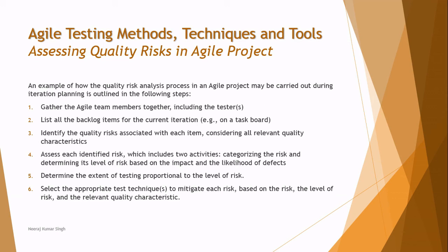Step five: determine the extent of testing proportional to the level of risk — how many test cases have you written and how much testing you are performing. You address risk areas depending on the level of risk, which is determined by impact and likelihood. Step six: select appropriate test techniques to assist your mitigation process based on the risk level, helping you overcome barriers in a more effective way.